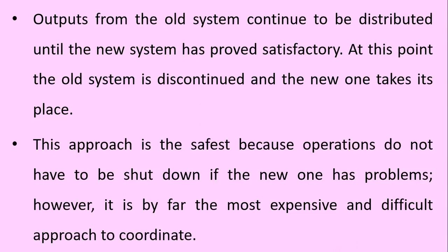This approach is the safest because the operations do not have to be shut down if the new one has problems. However, it is by far the most expensive and difficult approach to coordinate.